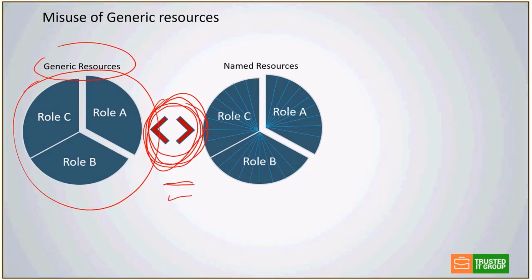Their capacities should be equal, meaning that if you have, let's say, 10 project managers, you would need to have a representative PM generic resource with the capacity of 10 people. The same thing for other roles. So all the named resources should fall into the respective generic resource bucket, and this generic resource bucket should have the appropriate size as the number of those actual named resources.